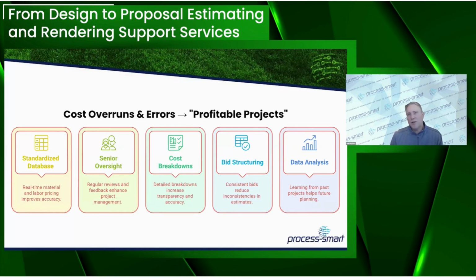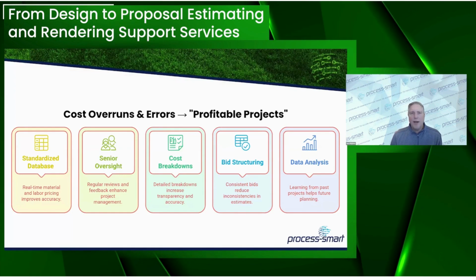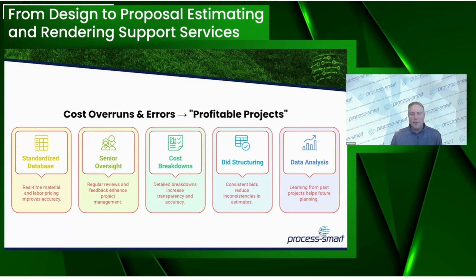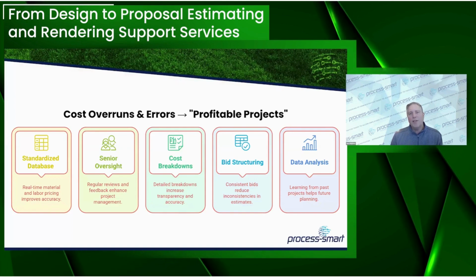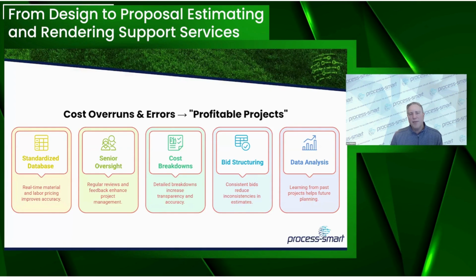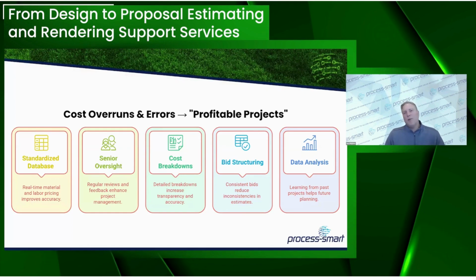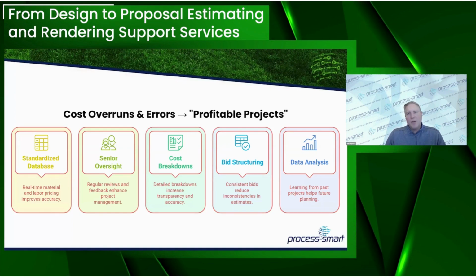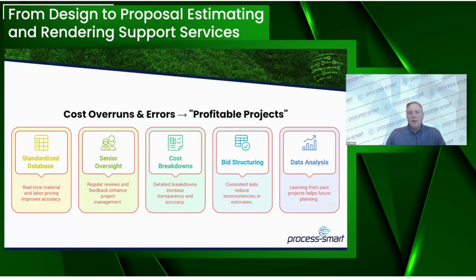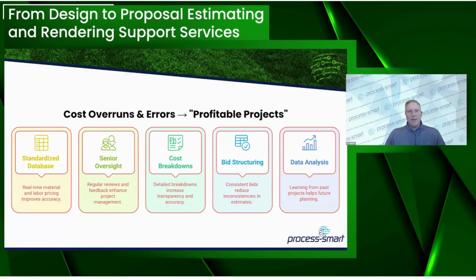The after action reviews are critical. If you do not have in place a way to compare your estimates to your actuals and then talk through the differences, positive or negative, on a consistent basis, then you're really missing out on a chance for optimization. I think the best processes I've seen are after an enhancement or construction project is done, senior management looks at the estimate, looks at the results, hours, costs, et cetera, and really drills into differences and then understands if there should be changes in the processes based on those differences.